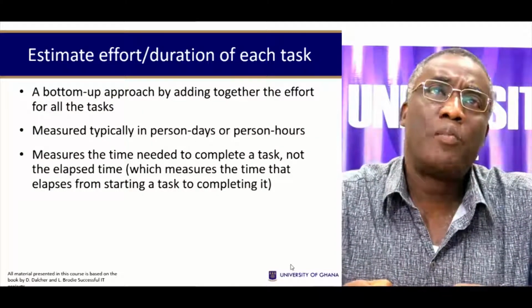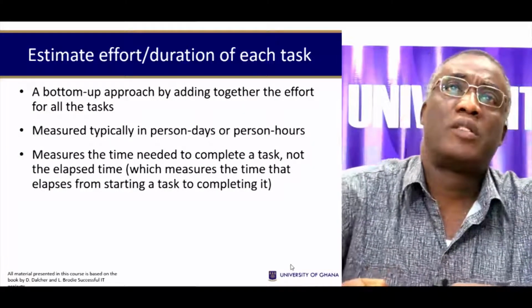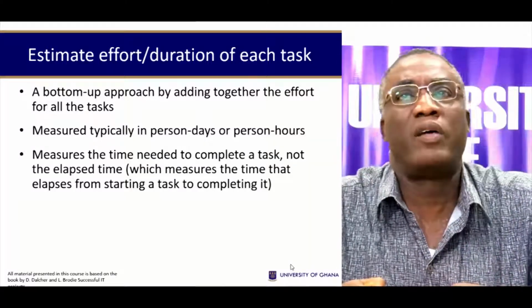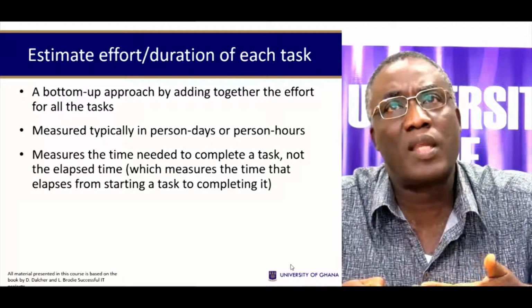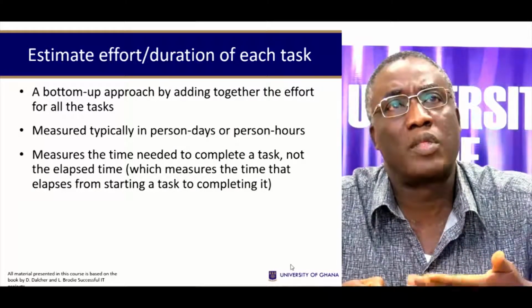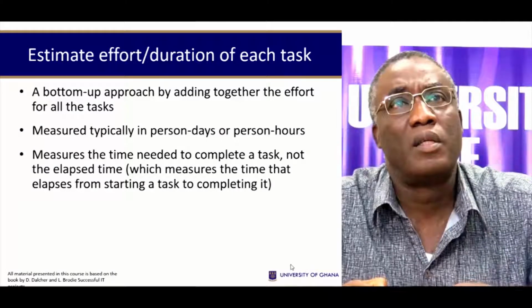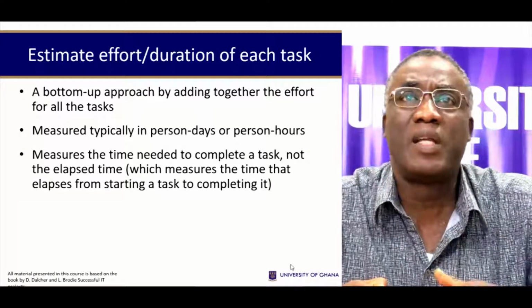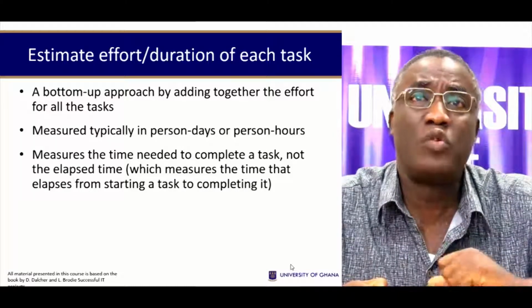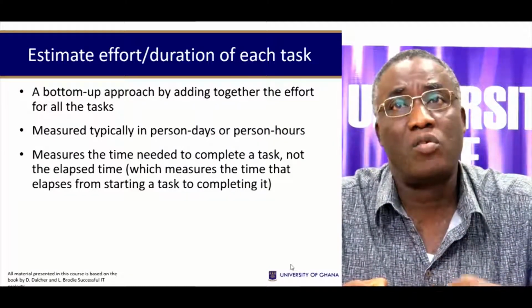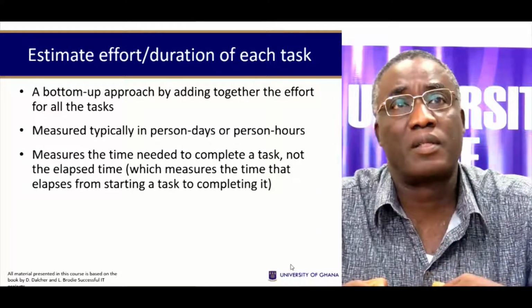Now, you can use a bottom-up approach to estimating the effort required for all tasks. That is, you add up together the effort from the bottom that is required. This effort can be measured typically in person days or person hours, which measures the time you need to complete a task, not the time that has elapsed.